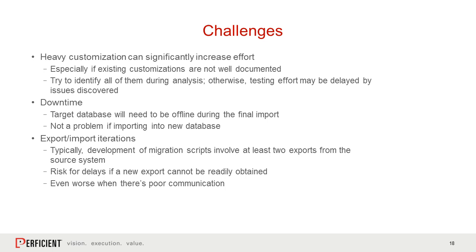All right, so we've gone over the process. We've gone into detail into some of the pieces. So what kind of challenges might we expect to encounter? Well, there could be some heavy customization. And depending on how that customization was performed and maintained, it can significantly increase the effort, especially if the existing customizations are not well documented.